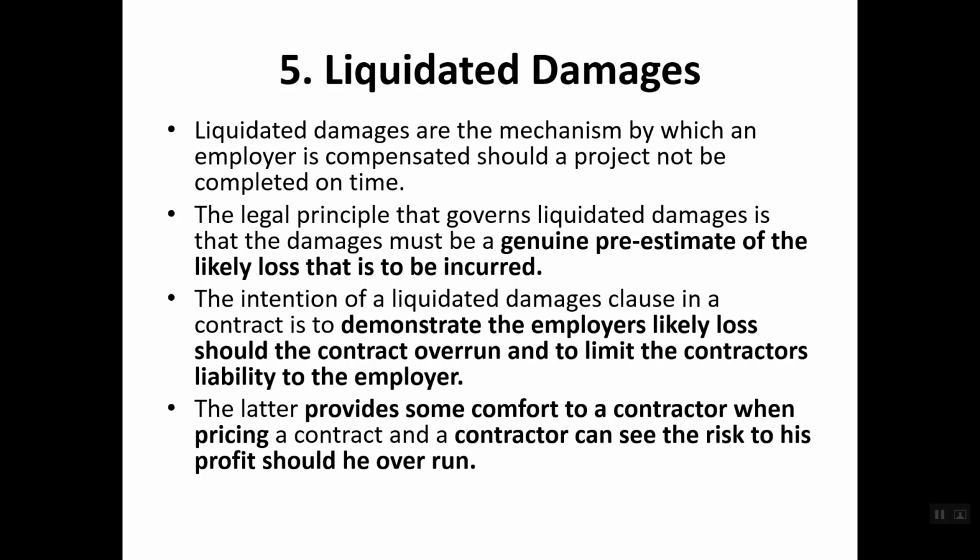So it is a risk. It is a risk for that particular tenderer. Then he needs to cover that additional liquidated damages cost for 1 month within his tender price. Otherwise, if you did not do it at the initial stage, at the end of the day, at the end of this project, you will be losing your profit. Why? It has gone to your employer as liquidated damages. So you need to make sure that you are not losing your profit because of liquidated damages. Then it will be a comfortable situation for your contract. If all the bidders are thinking like that, definitely your contract sum will go up, but contractors will not lose their profit.